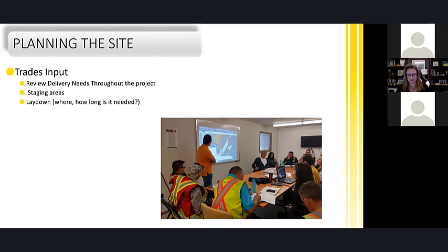And it was just because we had spent time bringing in the trades at the very beginning and having the conversations that we actually picked that up and sized our crane accordingly. It wasn't a big deal. And then it allowed us to open up some constraints that we had put down on other items, and actually made our job site a little easier for us to manage.